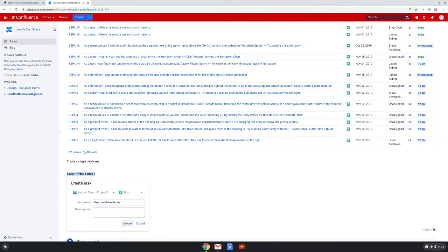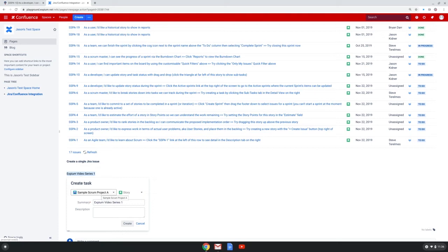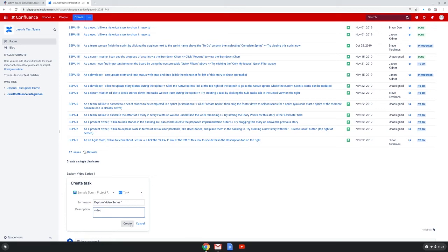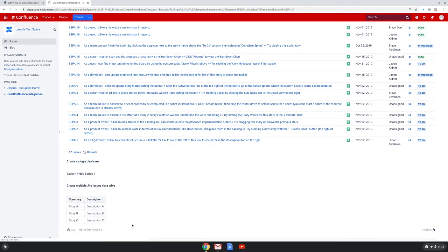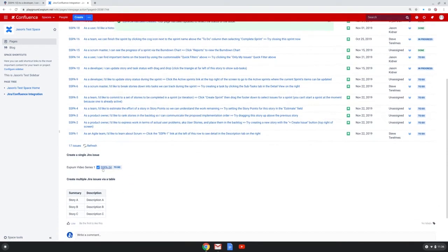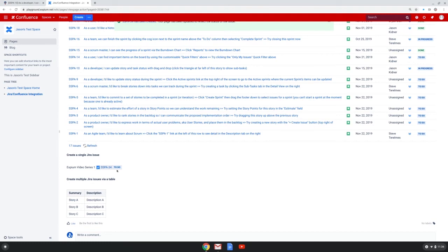I choose that option, and I then have the option to choose a project to create the issue in and an issue type to create. Note that these are governed by permissions in your integrated JIRA instance. I'm happy with this project, but I want to create a task, not a story. Notice that the text I highlighted shows up as the summary for the issue, and I can also choose to put a description in. You'll note that this is only two fields to populate, but this gets you started with the creation of an issue that you can later add more details in back in JIRA. When I click Create, the issue is created in JIRA. I can see the new issue key, I can see it's a task, and the workflow status.